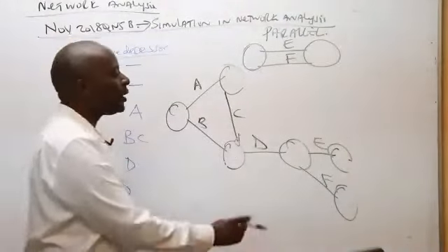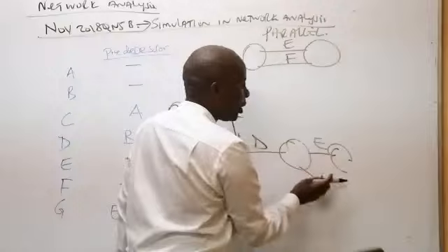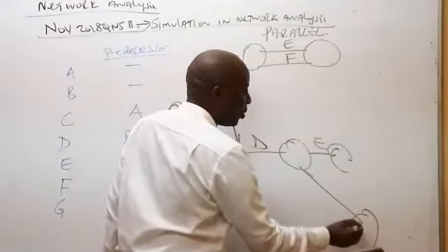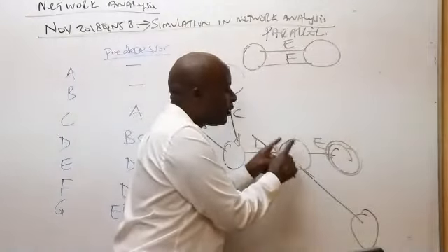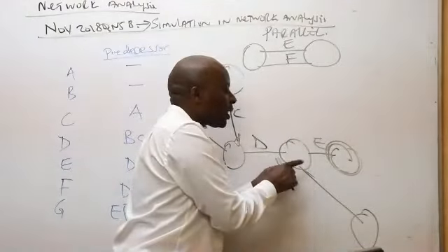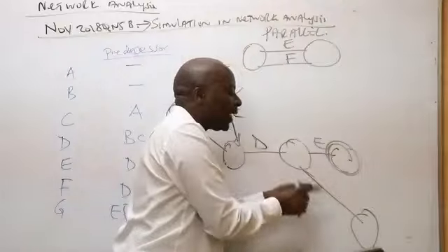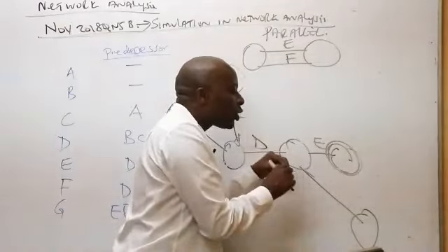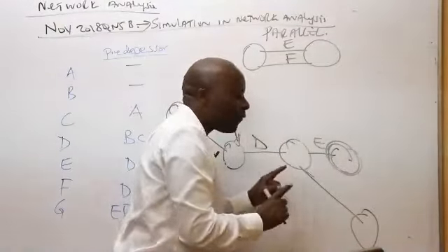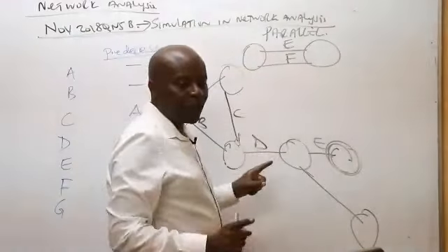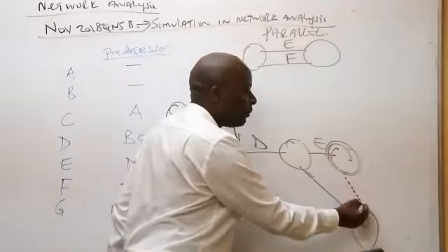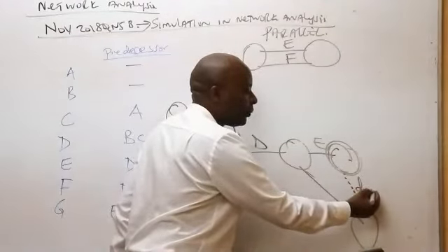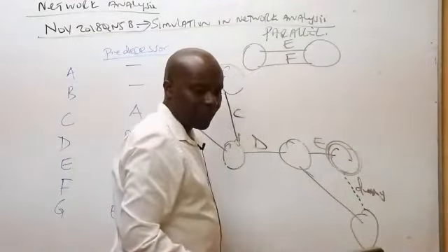So, ladies and gentlemen, here then the only thing that I need to do is to come and make F a little bit longer and then ask myself, if these activities here share the same start and they can't share the same end directly, then they can only share the same end in a fake manner. The fake manner is what we are seeing students calling a dummy, which is a dotted line. A dummy, like that.